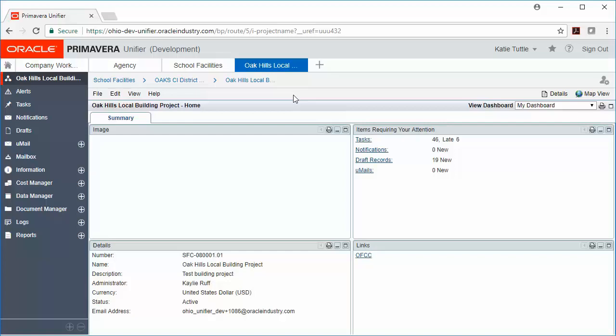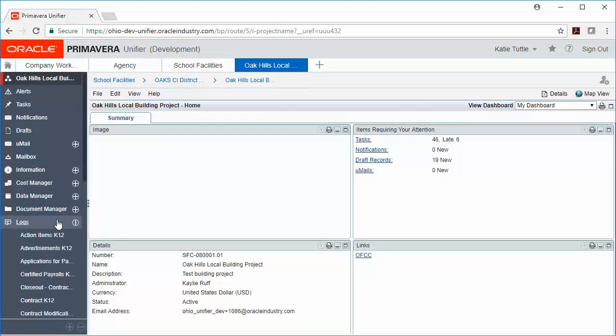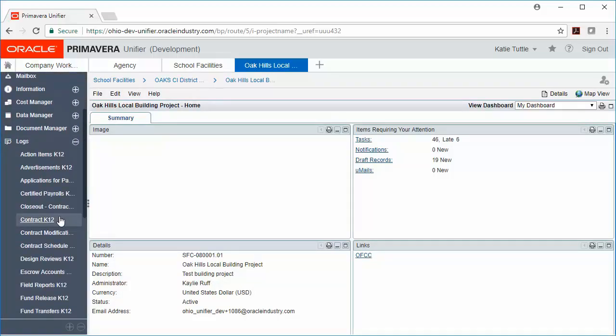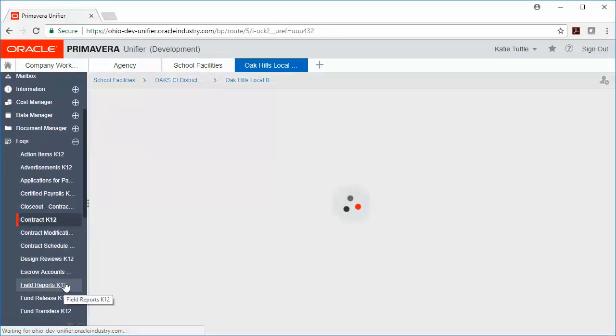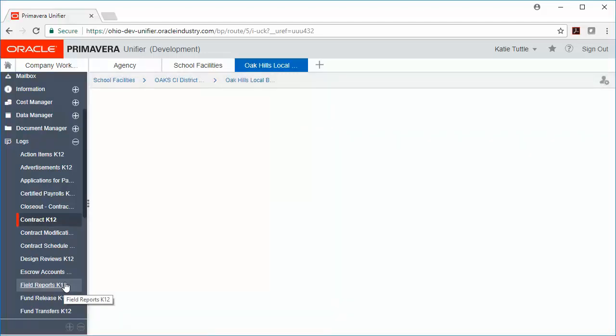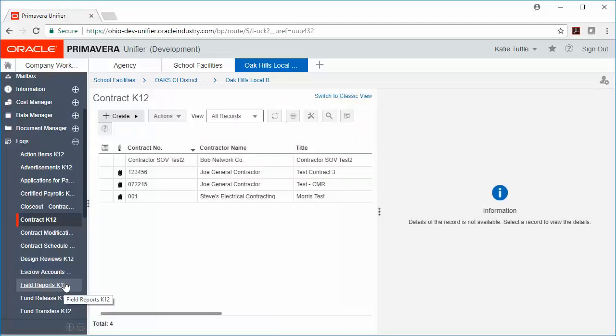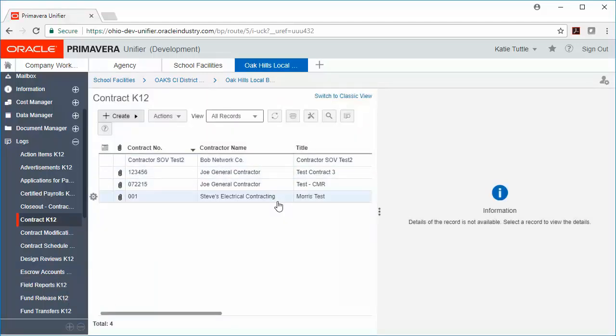That building-level project is going to house all of the records related to your CMR or to your contractor. So if I go to Logs here and I click on Contract, then I'm going to be able to see any of those CMR or general contracting contracts. This is also where all pay requests for your CMR or your general contractor will be housed.